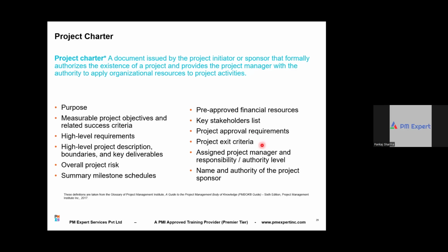But sometimes projects are prematurely closed also. When are projects prematurely closed? One is when, as a project manager, you feel that the project is not worth doing, or it's not a worthwhile investment proposition, right? Because every project, at any point, should have a continued business justification.